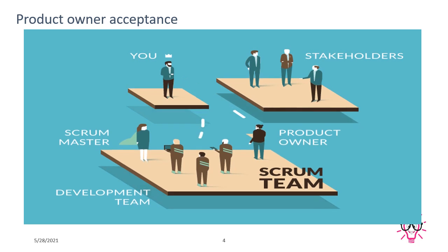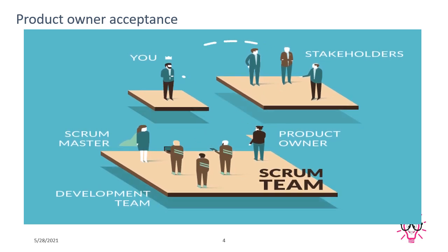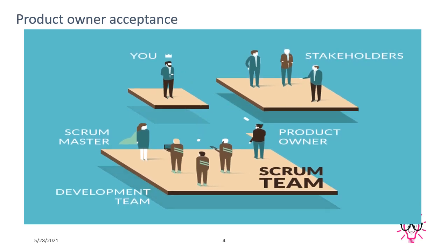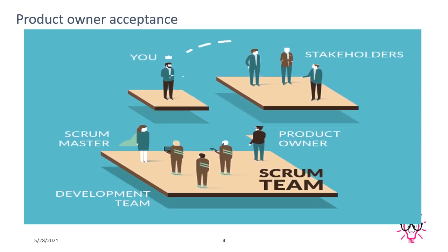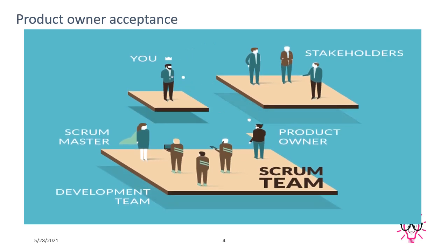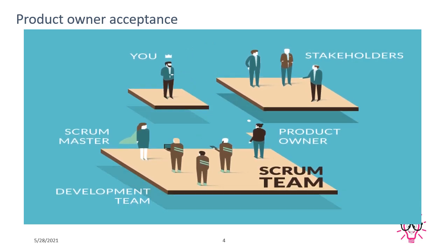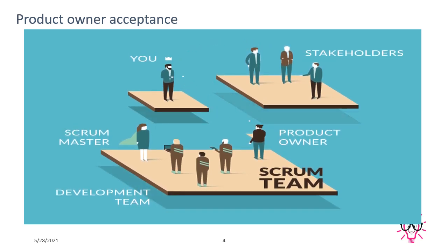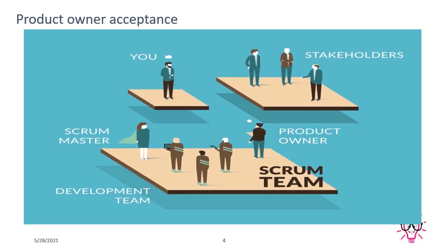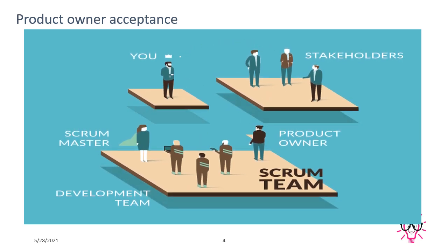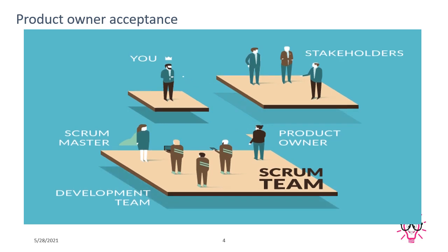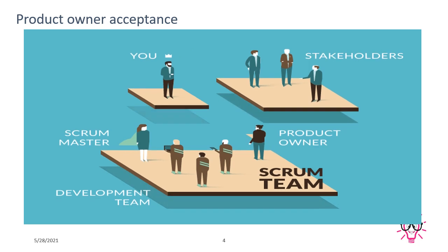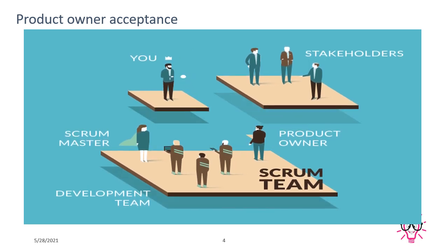Once the client provides this entire information, then based on it, when the product owner writes down the requirement in the product backlog, the product owner will also provide bullet points, the acceptance criteria. Sometimes the product owner doesn't write acceptance criteria for each and every story and task, but this is really mandatory, guys.